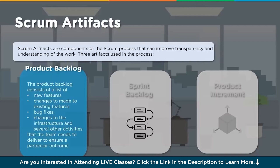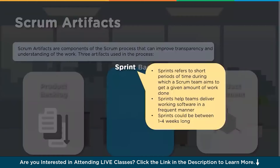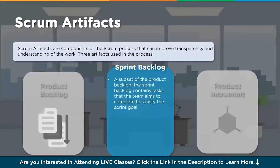As the dynamics of the scenario keep changing, additional items are reprioritized and added to the backlog. The sprint backlog refers to the short period of iterations where the team aims to get a given amount of work done, delivering working software frequently. A sprint can be between one to four weeks long. The sprint backlog is a subset of the product backlog - the prioritized items taken into the sprint, which is a time-boxed iteration.